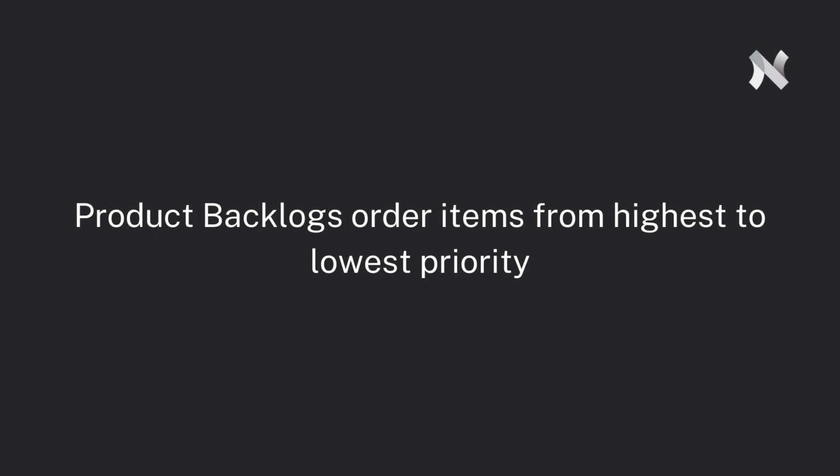A product owner may ask themselves, how important is this backlog item compared to all other items? Product backlogs order items from highest priority to lowest priority. This is called a stacked rank. Ordering items this way allows teams to operate more efficiently. When creating backlog items, the goal is to include as much as you can while not stressing about the unknowns too much.